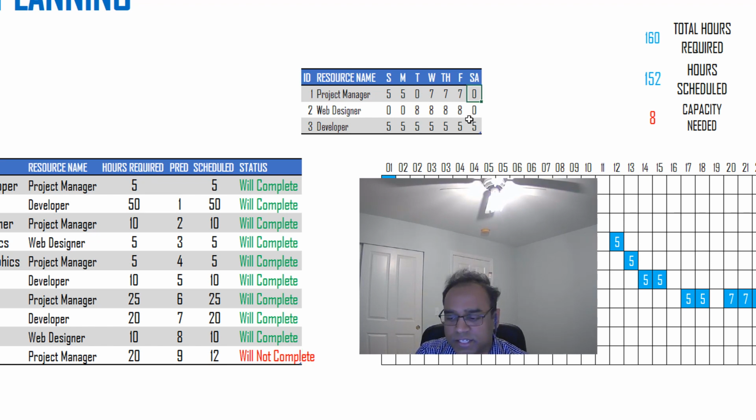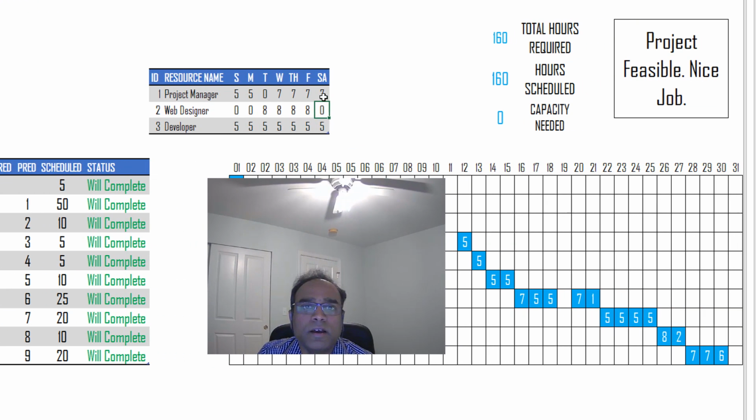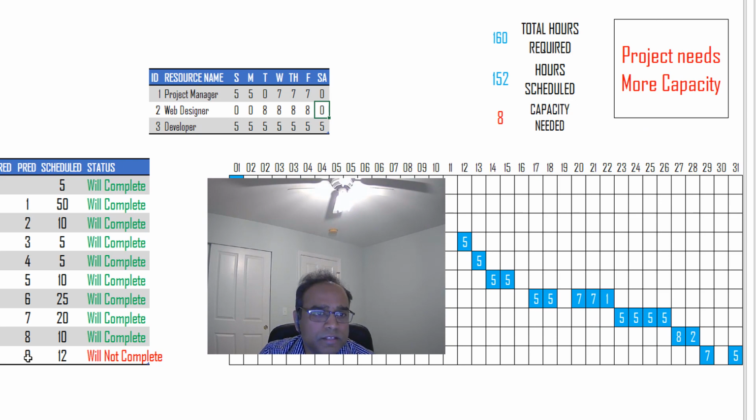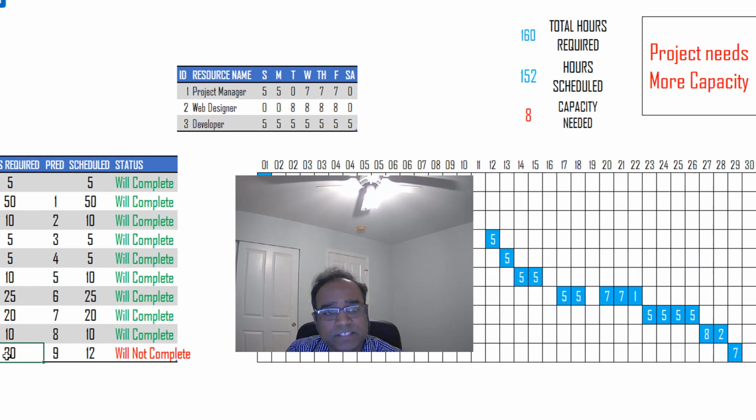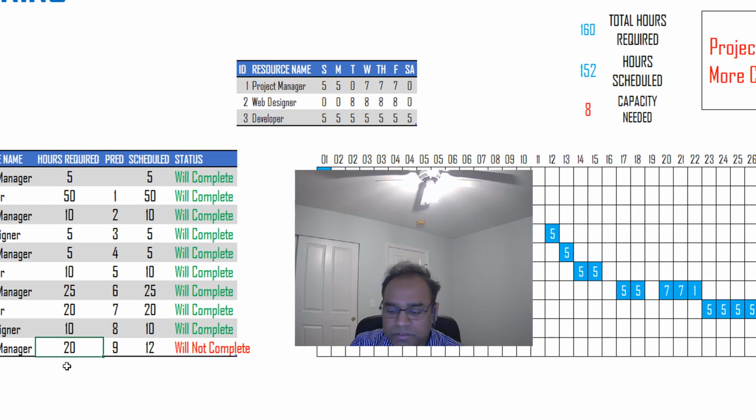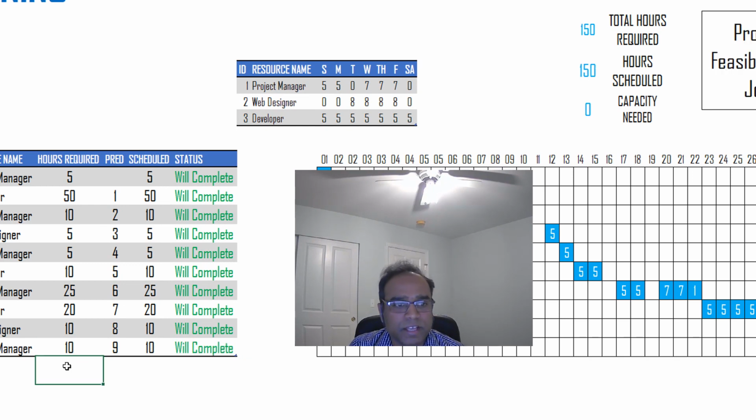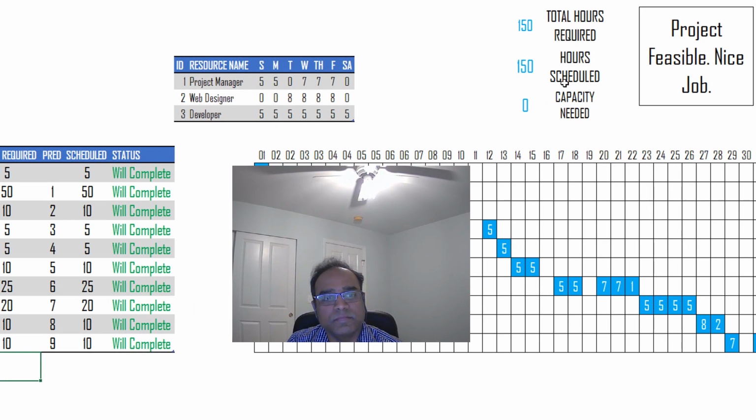So let's say I go in and say that the project manager works more, like 7 more hours on Saturdays. And that looks like that solved the problem. But another way to do it would be if you decide, okay, maybe this task which requires 20 hours, maybe we can do it in 10 hours. That was an incorrect entry, let's say. Now you change the demand, and by that also you can meet the capacity and the demand balance.